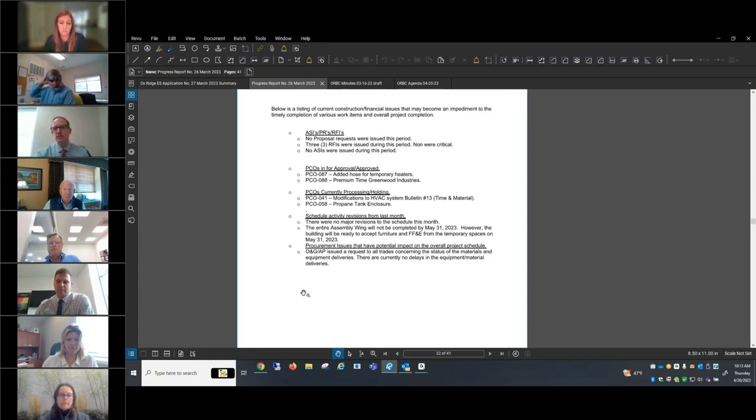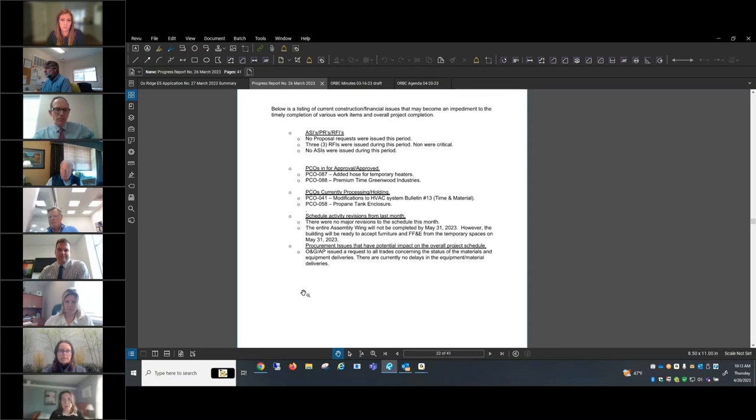That's correct. And honestly, Kip, in full disclosure for next month, we should probably take that May 31st date and dovetail it with the start of furniture and make it that June 15th date. If that's the day they're going to start bringing in the furniture for the building, then we would adjust the date to that. It's really not changing the trajectory.